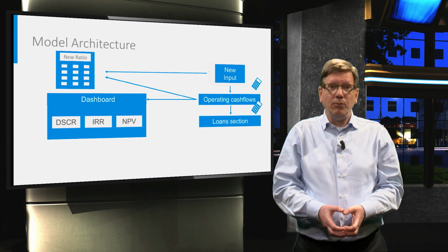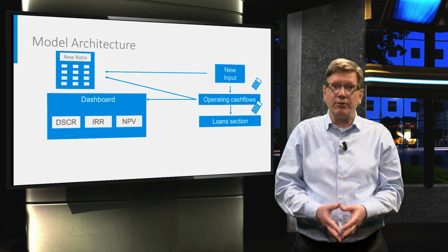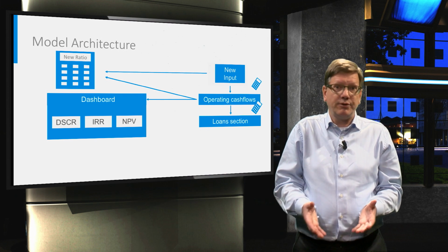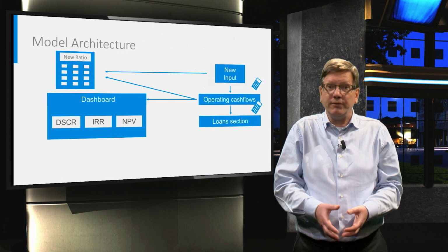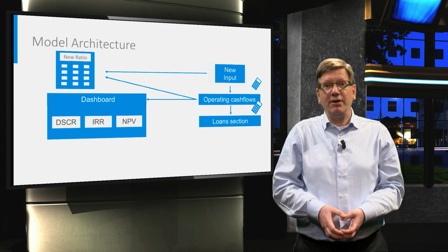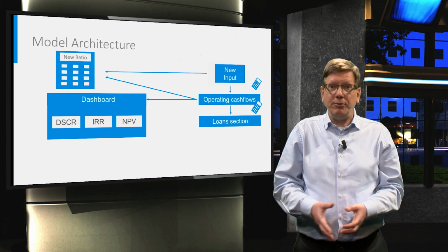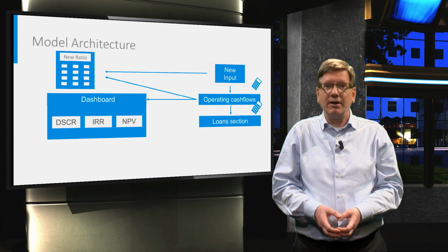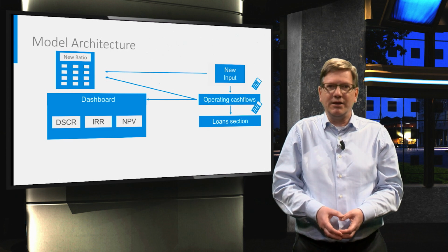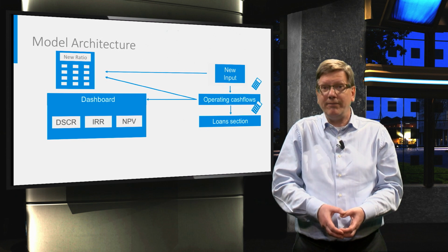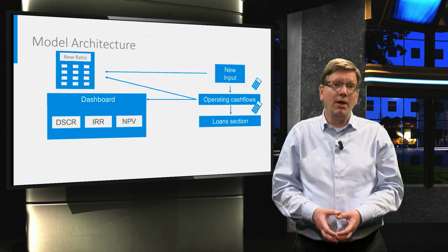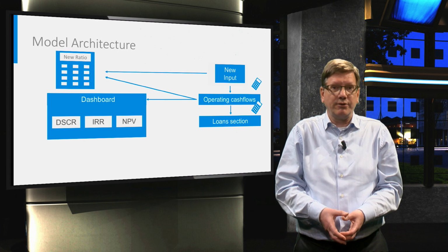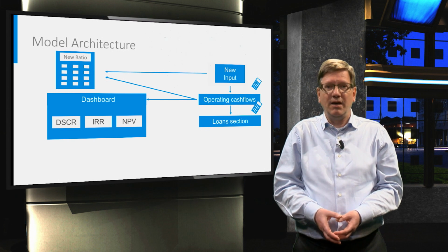The model will tell us when a change is so critical that the NPV falls to 0 or that we threaten to fall below a minimum DSCR threshold. That would create problems with our banks. Then we need to manage these risks to avoid that they will ever happen. For example, by entering into turnkey contracts or offtake agreements.